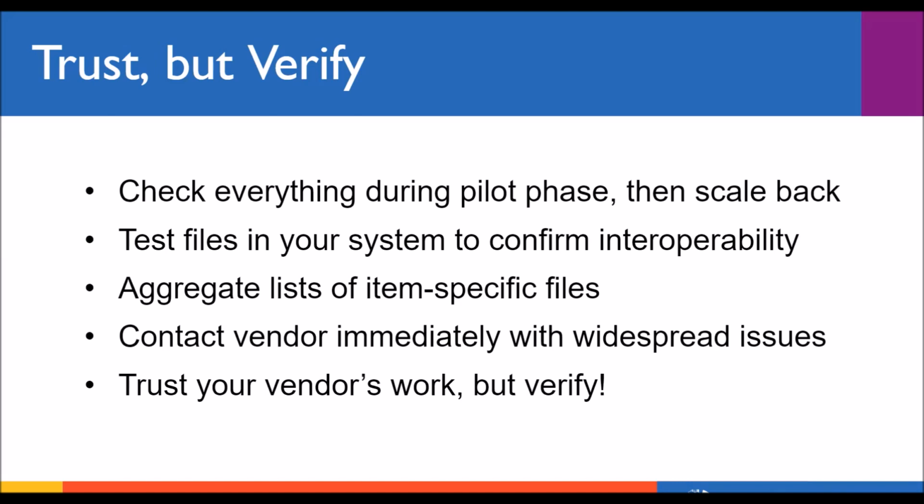Now, quality control tasks may need to be undertaken by multiple staff members, depending on what is being reviewed. Staff members closest to the collections may be better suited to review the content and the subjective aspects, while other staff could be employed to review the technical specifications. After successful pilot projects, organizations will often only check a subset of the files unless they find many issues and those require a closer inspection.